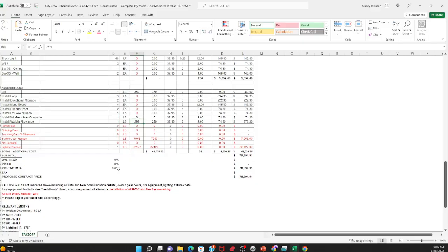Again, if you guys are using 40% overhead, what are you using as far as the hourly rate? Are you using a base rate? We use about $30 an hour. Okay, then that's right, because your hourly rate's not very high. So your overhead, and then I would do a profit of like 15% if you're going with $30 an hour for the base rate.